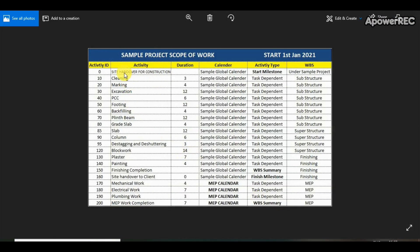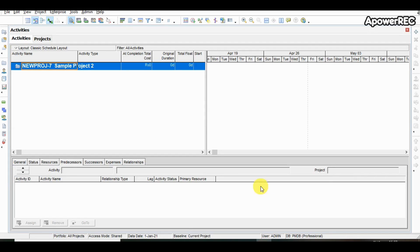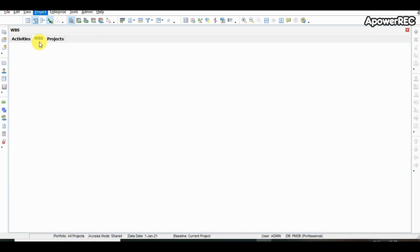Now let us begin to develop a level 3 schedule in Primavera. We have taken all the input — what are the activities in the project, what is the scope, what will be the duration — and now we need to develop it in Primavera. We have also defined the project, and now we are defining the WBS.